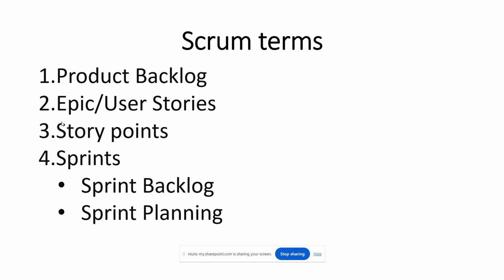And one of the things I'll even mention now is teams tend to fall into estimating user stories by how many hours it will take to complete. That is not recommended in Scrum. We actually want to use something that's not an actual numeric measurement, but we want to use numbers as a comparison in total effort that something would take.